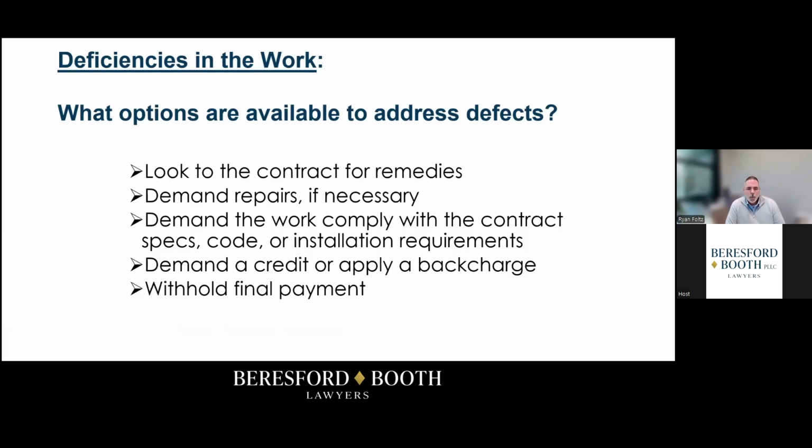Finally, one thing that you should always do as an owner is withhold final payment until all issues with the work are resolved. A lot of times the final payment is tendered after what's called a punch list is performed. In other disputes, if you have large, significant disputes to the work, withholding of payment usually is a means and method to hold a reasonable sum that's going to cover the cost of repairs or remediation to complete the work if the contractor is not willing to come back and complete the work at his own cost.